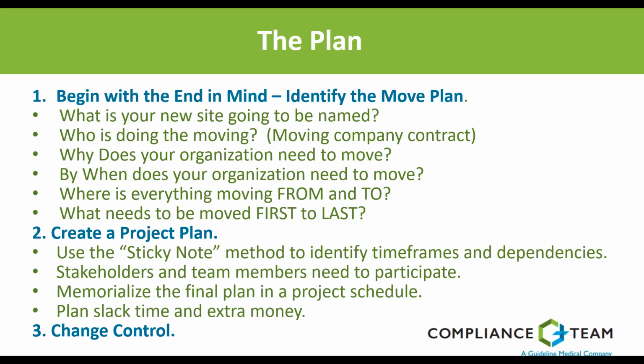So, some fun little things to think about is, what's your new site going to be named? And the reason why I actually put that question is that when you're writing your site validation master plan, you have to be able to give your old site a name and your new site a name. When it's moving from point A to point B, what are you calling point A? What are you calling point B? So everybody has a common ground as to what that's going to be called.